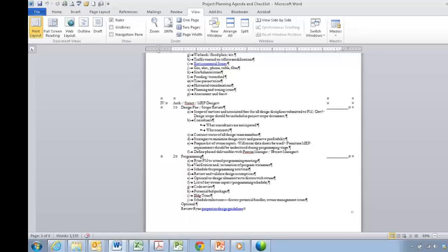Or is Ryan going to contract directly for all the design services, or are they going to be rolled up under another designer? All those strategies need to be worked out up front and clear, because there are multiple ways that it can be done. Perhaps the most important thing about this, though, is getting it done early and tying it back to that timeline, because the manner in which you have handled this portion of the job establishes how you'll be able to achieve your timeline in getting to the construction phase.